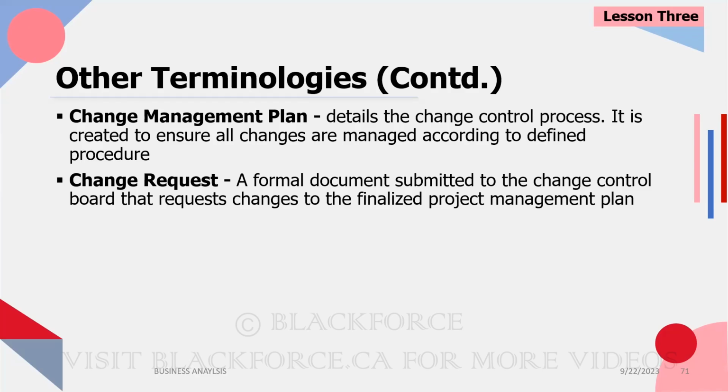And then we talked about change request. I already talked about that. It's a formal document submitted to the change control board that requests changes to the finalized project management plan, meaning that whatever this change request is, right, it would eventually have an impact on the project management plan. Because if we say we're going to be implementing this for 3 months, right? And somebody is asking for a change 1 week to the end of 3 months, well, you're not going to finish in 3 months, meaning it's going to impact the project plan.